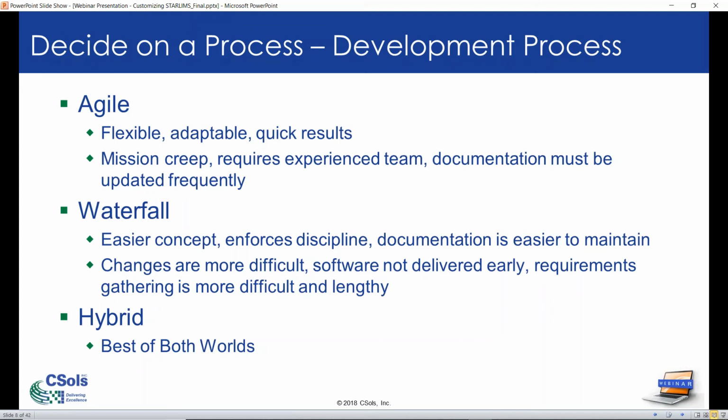With waterfall, stages of a project are tackled one at a time, where the following stage isn't started until the previous one ends. For example, from requirements gathering to design, build, testing, and release, each step is completed in turn. With an agile process, stages of a project are repeated in sprints or other smaller chunks in order to complete the project in smaller increments. In that way, the end product can be developed in iterations, allowing for more review and understanding throughout the project.